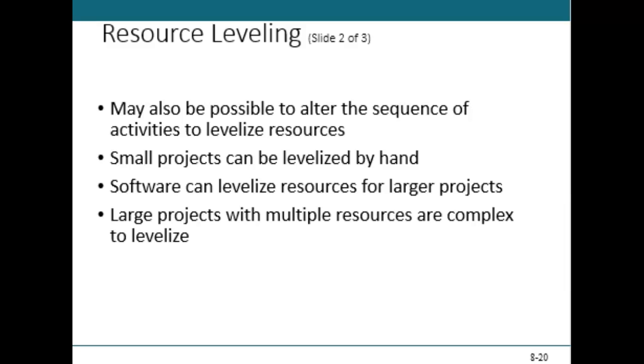So really, what is the difference between resource smoothing and resource leveling? They sound the same. They are close. There's a razor-thin margin between the two, really. But resource smoothing is used when the time constraint takes priority. So the objective is to complete the work by the required date while allowing peaks and troughs in the resource demand, right? So resource smoothing is when the resources are unevenly allocated. And so resource smoothing does not touch activities on the critical path.